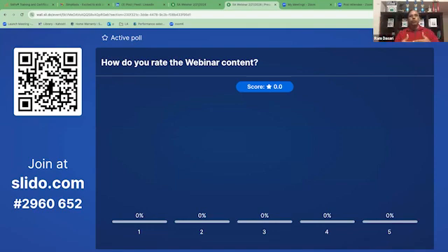The ART which follows that is the team of teams, and the ART will look at that solution roadmap and also the portfolio vision, and try to identify what they need to focus on in the next 3 quarters at least. 3 quarters is 3 PIs. So they will forecast what they'll be focusing on. They have decomposed those epics into features as part of the ART backlog. Those features are bigger than the stories, but they have one rule: the features need to be completed within the same PI. A PI is 2.5 months, 5 sprints, so it should be completed within that 5 sprint time period.